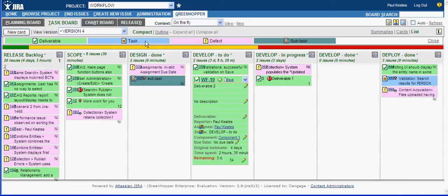Subtasks. Subtasks, we can go into this a bit more. There's another view I'll show you. Subtasks are dependent on tasks. You can have only one level deep. You can have a task with as many subtasks as you want, but you cannot have sub-subtasks. You can't just keep chaining them indefinitely. And that's actually a feature, and I quite like that. You don't go crazy with these nested structures.